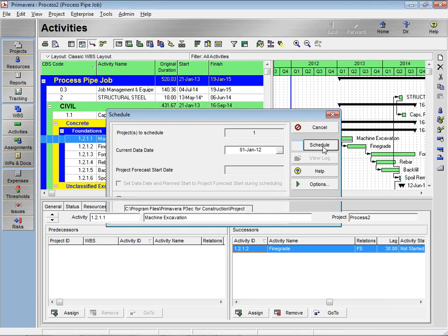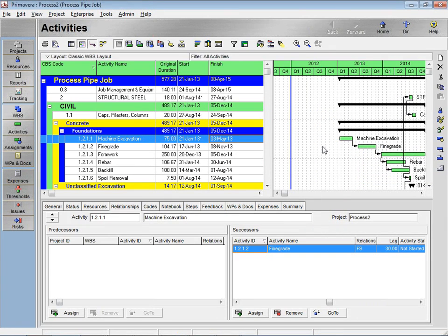Okay, so now we can answer the question, well, if we move the project start date to where we just moved it, and we do the work sequentially rather than with start to starts on those earthwork items, well, now we're finishing into April 2015. Okay, the beauty is now I don't have to remember to go back to my estimate and reflect those changes.